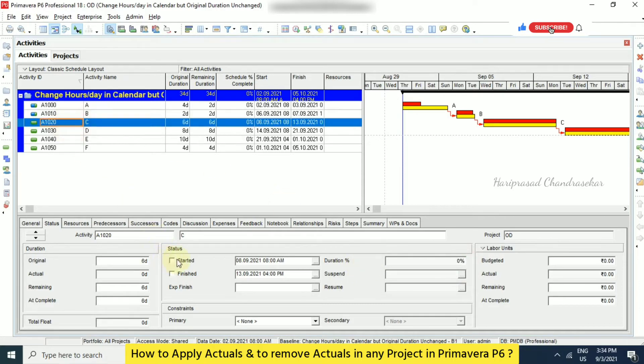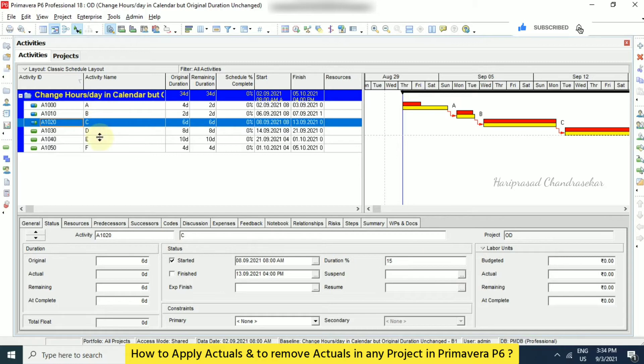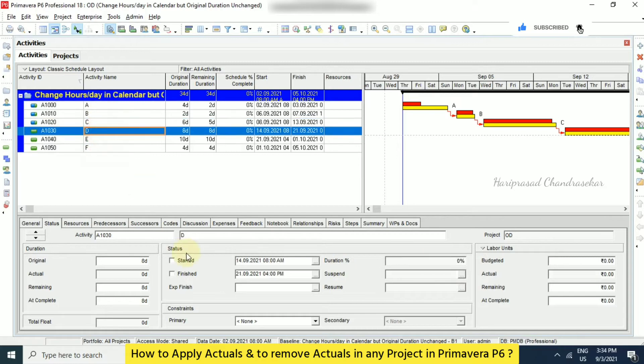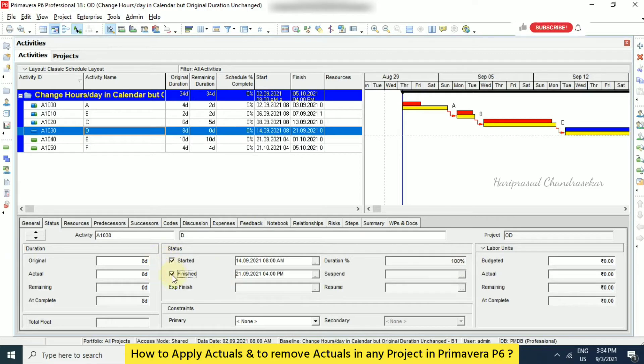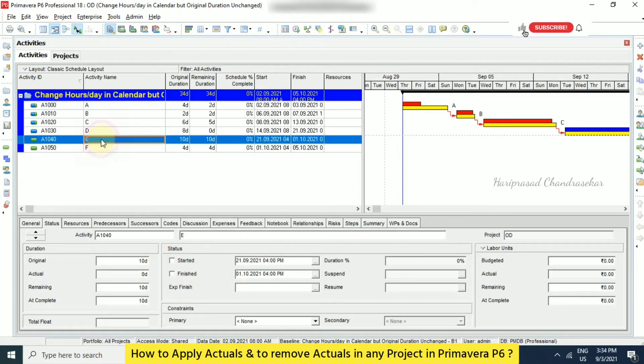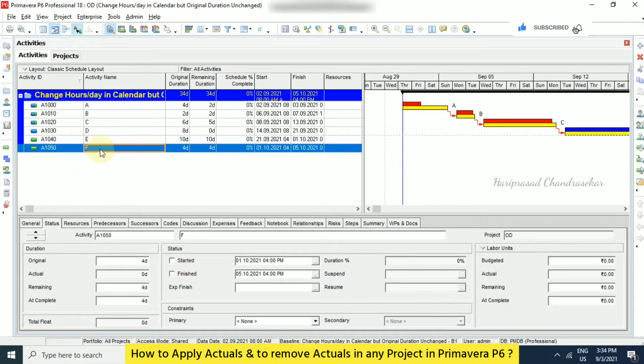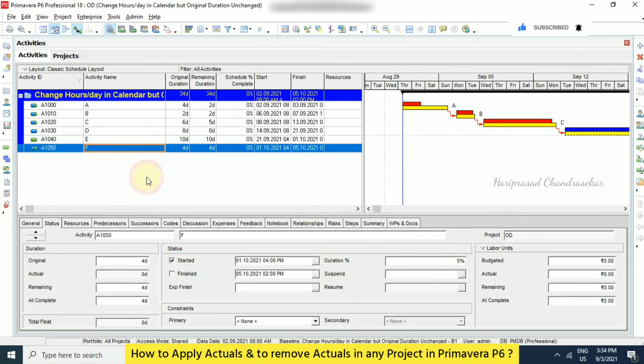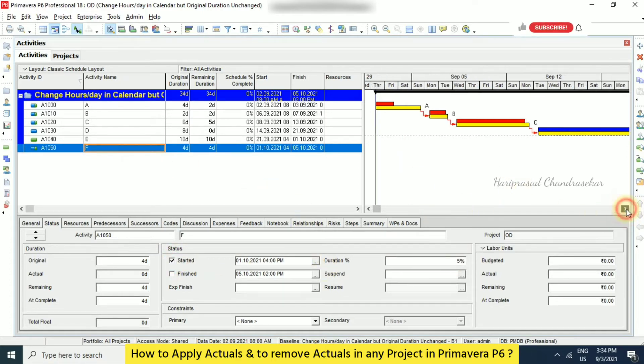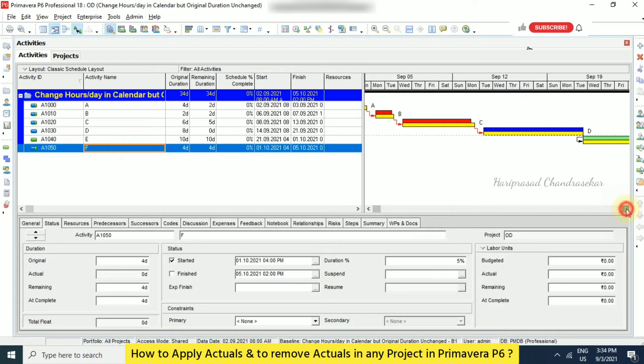Again, I am just putting starter and then 15 percentage. For example, this one started and finished, so it will automatically become 100 percentage because we selected finished also. So the fifth activity, I am just going to leave as it is. And then the last activity, I need to put starter and then just 5 percentage. See, we can see all these things updated here in Gantt chart.